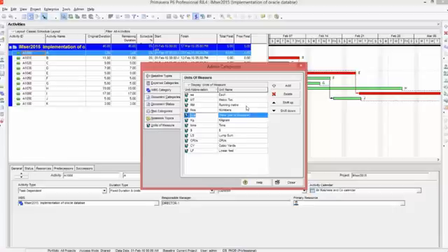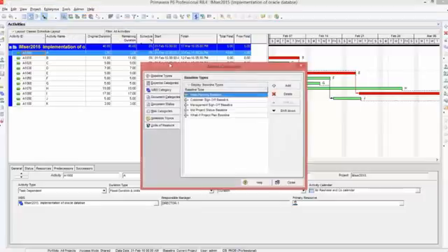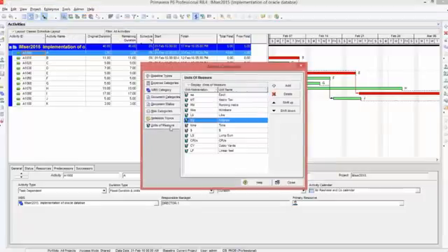Let's say petrol is measured in liters. LTR is the abbreviation and unit name is liter. Okay. So this is how you create unit of measure. It's very simple. You can go to admin categories, then go to unit of measure and press add. Just give unit abbreviation and unit name. Then you can close it.